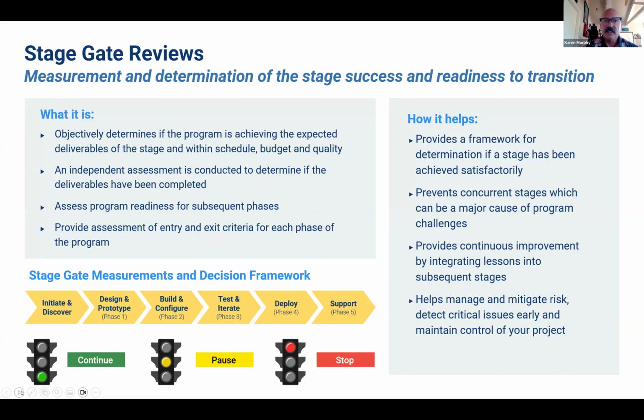And it's really quite easy to prepare a standard set of stage gate criteria. You probably identified these on all your programs. You may just not have put them into one library and have them as a basis of a checklist to help with your project assessments.